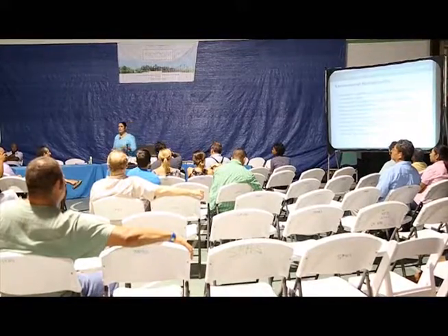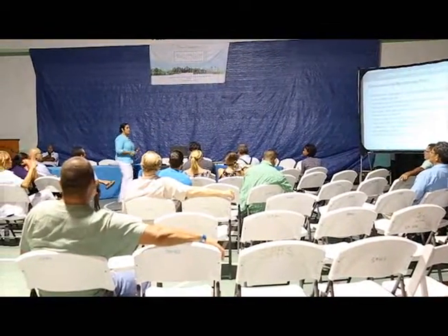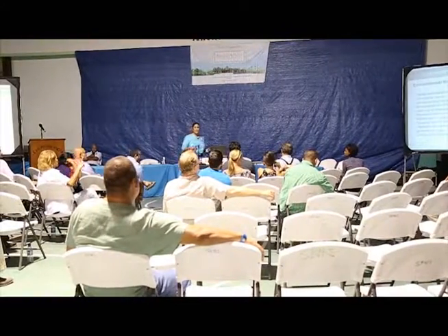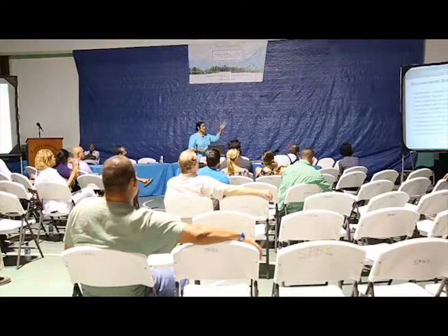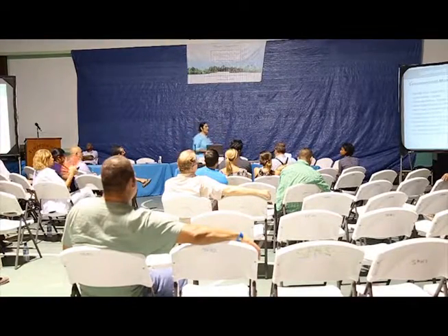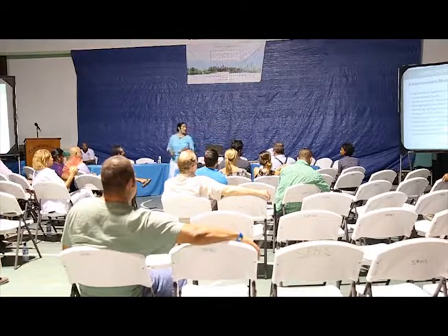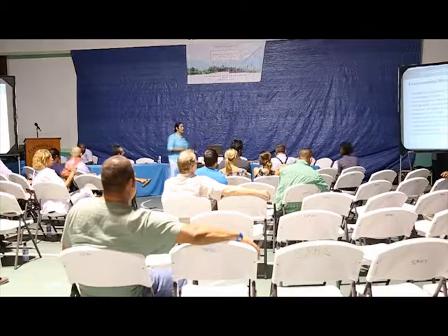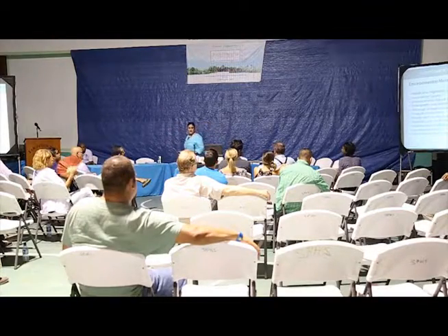Following the environmental impact assessment, which this is a part of, an environmental monitoring plan is going to be put into effect to ensure that we are complying. And these are the different categories. I won't go through all of them, but we look at things like habitat and vegetation to see if we're actually doing the improvements that we say that we are, the historical, the wildlife, the fisheries, and community and environmental health, and all of those areas.